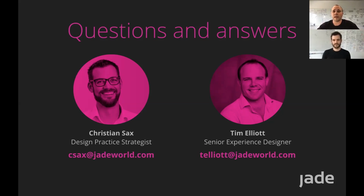It's also about time boxing, because often what we find when we walk into organizations is that some of these processes have been going for months and they're just getting stuck in circular discussions. What this helps with is to just make a decision and move forward, or say this is our best understanding, our best bet, and just test it, because we can discuss it infinitely, basically. What we're after is to build something small, cheaply, quickly, test it, and see what the result is. And based on this, you can then make your next step decisions.